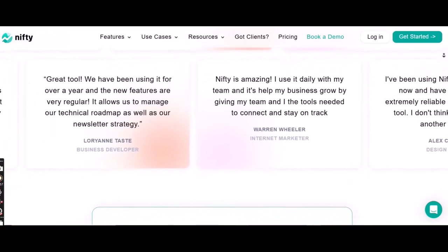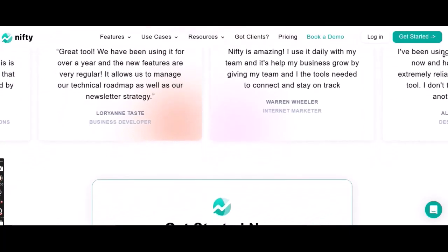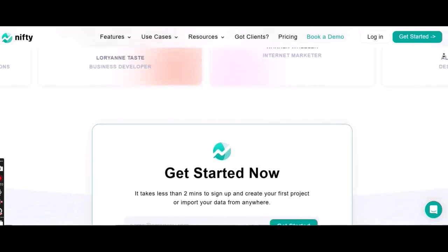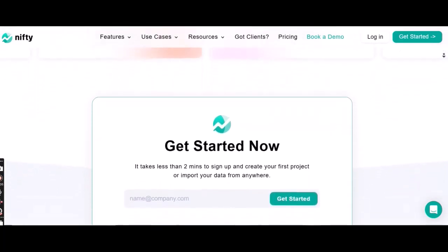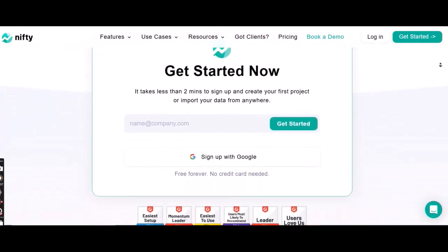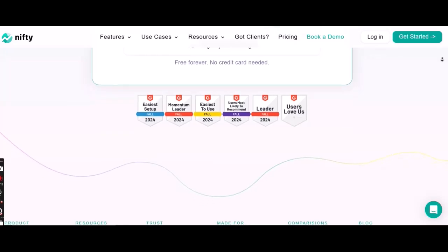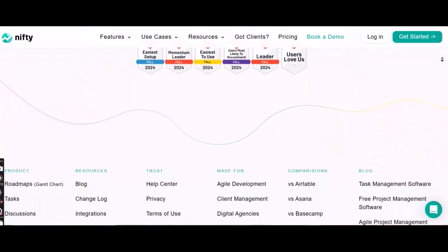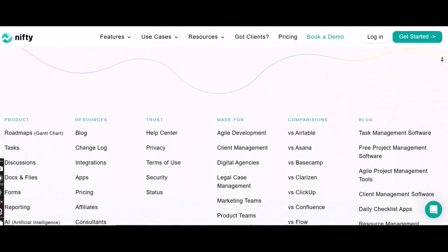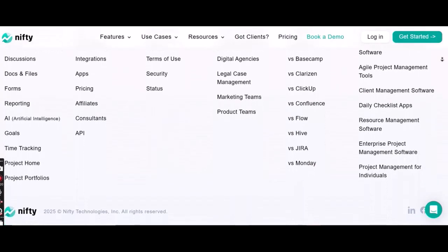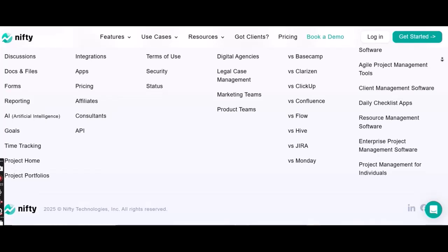They act as key checkpoints on your project's roadmap, providing a clear visual representation of progress towards significant goals. Tasks and subtasks. Under each milestone, you define your tasks, the actionable items that need to be completed. Tasks can be further broken down into subtasks for more granular detail. This hierarchical breakdown ensures that every piece of work, no matter how small, contributes to a larger objective.